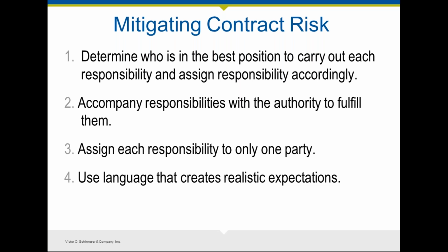The last thing you want to happen during a claim is to find out that your written agreement that you took pains to negotiate with your client no longer reflects the current reality of where the project is at the end of the project. So if there are additional services that have been done, those need to be documented. You need to amend your agreement to make sure that what is indeed the current state of your project is reflected in your agreement.